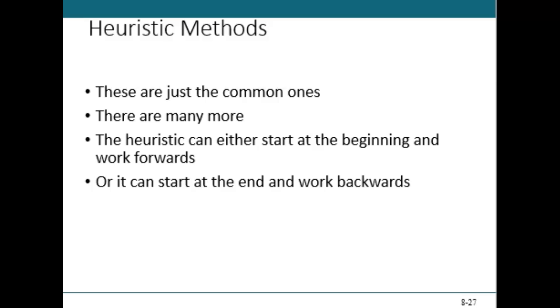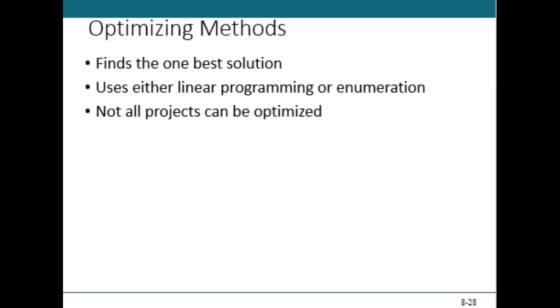They have the advantages of being simple to understand, easy to apply, and very inexpensive to use, these adopted computer programs, right? The difficulty in relying on heuristic methods, however, is that there's no guarantee that the schedules developed are of the minimum duration, right? So you want to keep your eye on that.